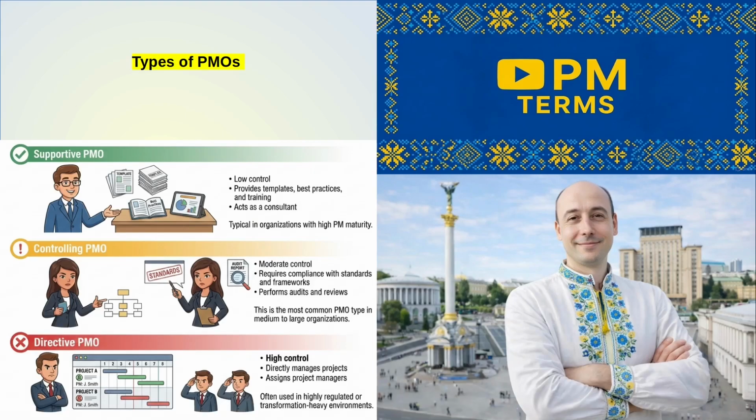Finally, there is the directive PMO. This type exercises high control and directly manages projects. It also assigns project managers, often used in highly regulated or transformation-heavy environments.